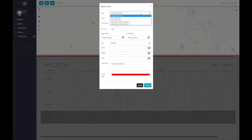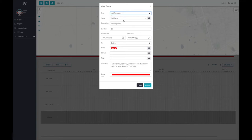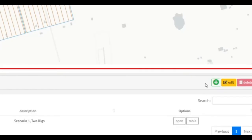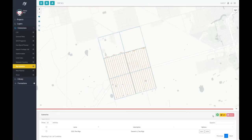The first drop-down in the event pop-up allows you to select templates that will pre-populate your form based on the type of well you would like to create. Here, well template 2 is selected, which assigns the drill skill and drilling related tasks to the well that should be completed before the well can be assigned an active status. Task completion can be edited in your schedules table, which is accessed on the page that first appears when the Rig Schedule extension button is clicked on the side menu.